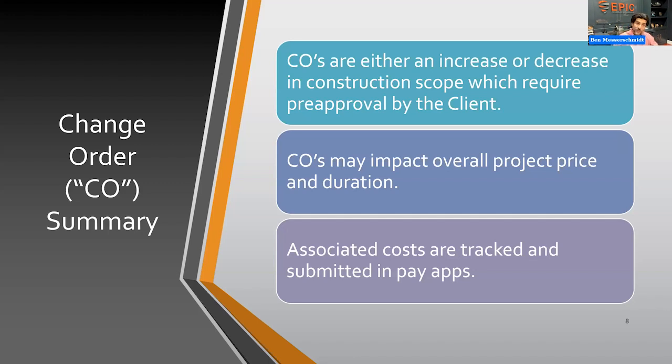Because falling back over to the contract, there may be liquidated damages specified in the contract if the contractor does not complete their project or their job by a certain date. They may be fined $50, $500, $1,500 a day for any of those delays. So that's going to be critical. Contractors are certainly going to be very mindful of it, as well as the association.